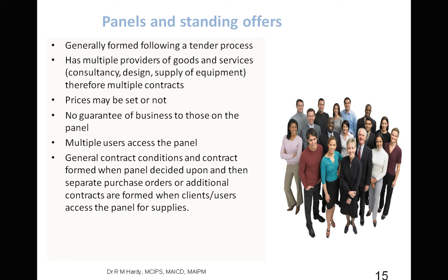And generally the builder will do it, or they may itemize certain types of work into a rate which they will accept. So we will replace a stud wall for X dollars per linear meter. And once all this is known, it's just a matter of calling them up and saying, we've got 5 meters of wall to be replaced. When can you do it?